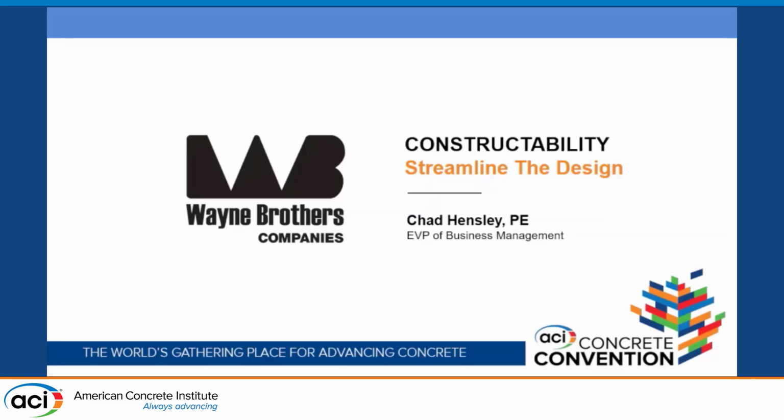Anybody else? So, just in general, IPD is a type of delivery method where all the major players are brought under contract very early, when the job is nothing but a conceptual design. And you're contracted and paid as a concrete contractor, the steel fabricator, steel erector, mechanical contractor, electrical contractor, general contractor, design firm, and owner all work from the very beginning of the design process all the way through to try to help develop the most constructible, most efficient, most optimal design, utilizing everybody's talent in the room.